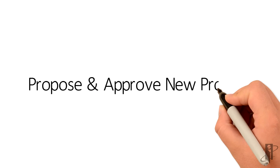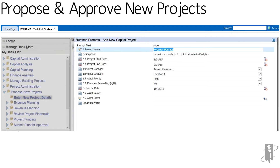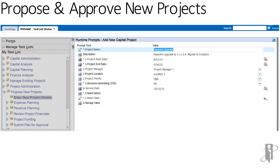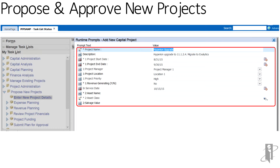Within PFP, end users have the ability to propose new projects and approve them. There are pre-built task lists within the PFP application and end users simply follow the task list to plan out their projects. They can go to propose new projects, right-click, enter the new project details, and that executes a business rule where they can enter all of the applicable information: the project name, description, start date, end date, project manager, location, and priority. For a project surrounding a capital asset, they can enter the end service date, and it ties in those capital asset pieces so that you can calculate your future depreciation expense.